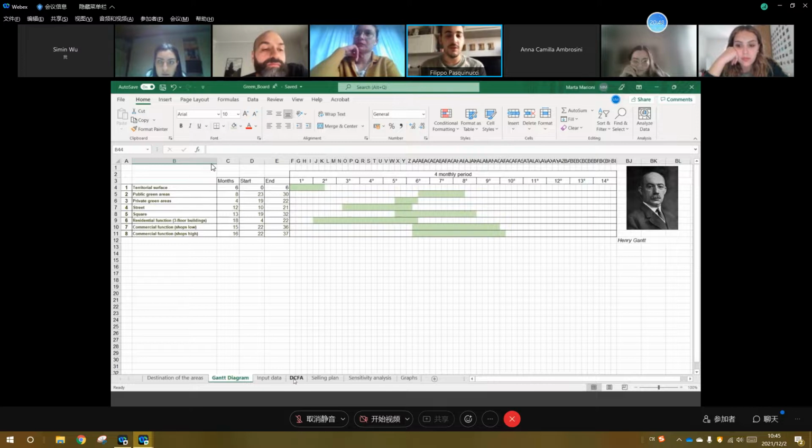We didn't know whether to divide by the surface, the square meters, and use it as a coefficient to multiply with our surface, or to take the same amount of time and, in the hypothesis, consider we have maybe more workers, more companies working at the same time. So for the moment we increased them a little and tried to coordinate the different works all together.